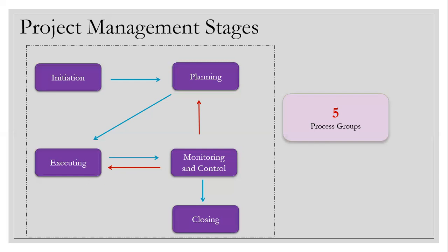Once you are done with the WBS and the scope baseline, then you get into activities, the network diagram, then scheduling, finding the critical path, and then cost. You might be thinking, why do we do all that in sequence? The answer is that if my scope is crystal clear, which is a 100% must for any project, at least for any waterfall model project. For agile, it's fine, the scope keeps on changing. But for a waterfall project, you need to be 100% sure about the project scope in the beginning of the project.